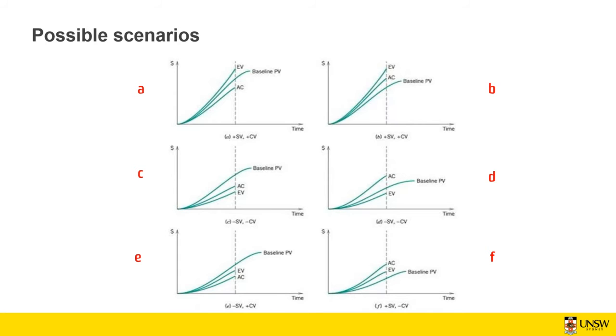But scenario D is probably the case where you're paying a lot of staff, but for some reason the work has been delayed and they don't have anything to do, and because of that, earned value is considerably lower compared to the actual cost. D is the worst situation compared to C. So probably one of the worst situations in any project.